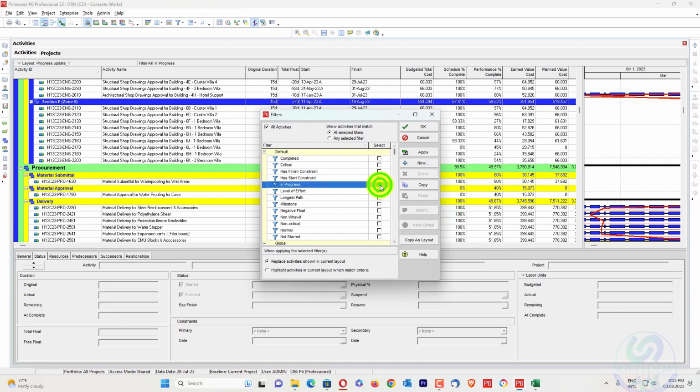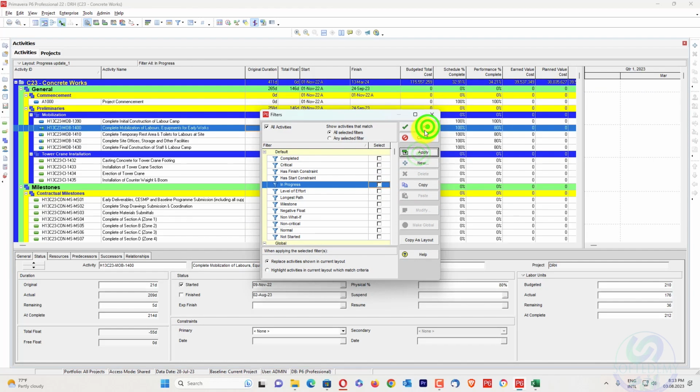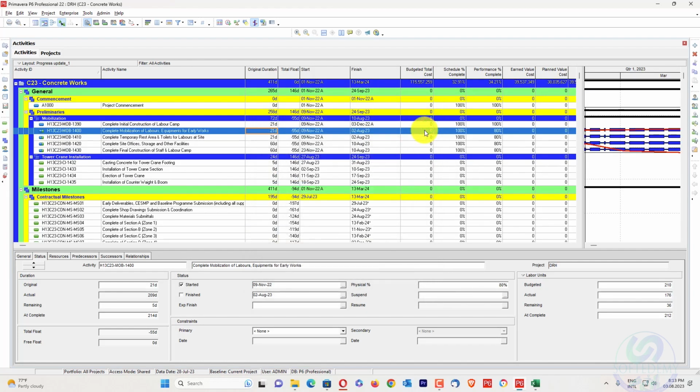Next, I have to explain the difference between a revised schedule and a recovery schedule. A recovery schedule does not have any change in scope of work. If there is a change in scope of work, the schedule will not be considered a recovery schedule. First of all, there should be only a mitigation measure in a project. At that stage, you need to recover that project.